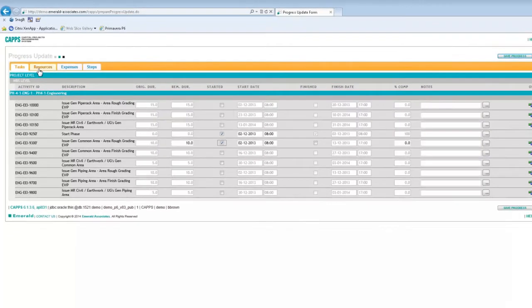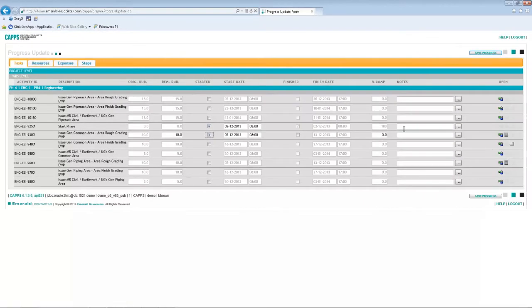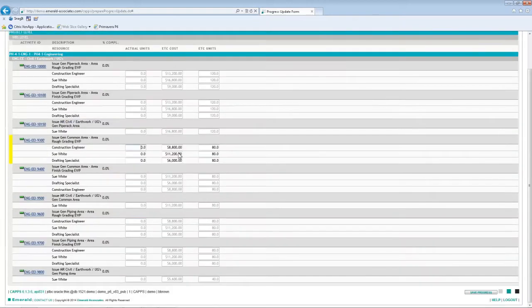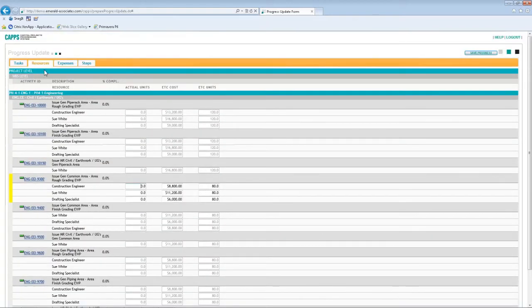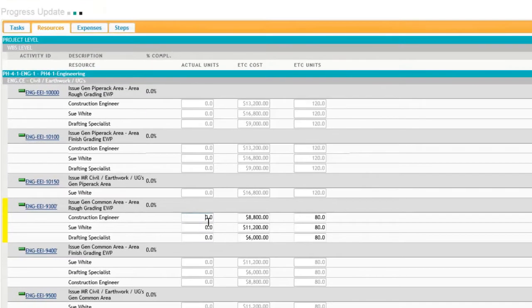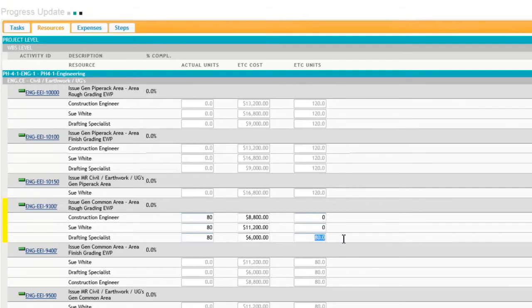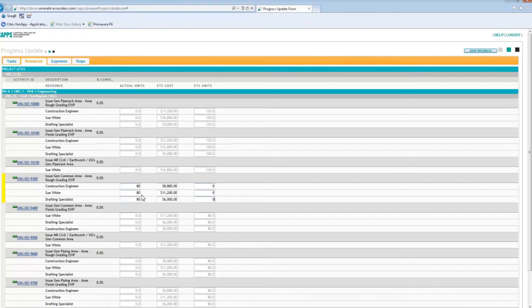Now I can use the resources tab, or I can simply click on the icon, and it takes me to the resources tab, and the activity is highlighted, so it makes it easier to update. So I will enter the actual units information for all resources. I have three resources on this activity, and of course my remaining units are zero for each of the resources.